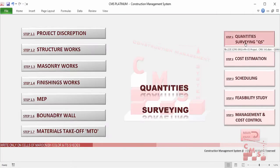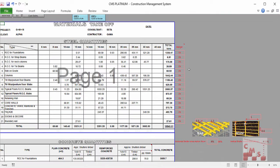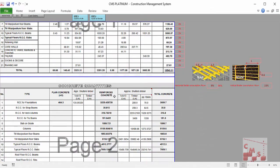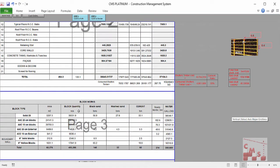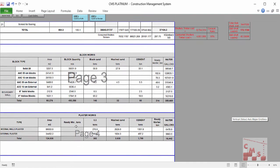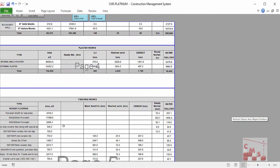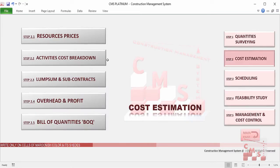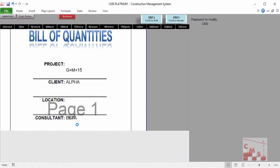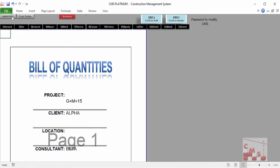We'll see how CMS will help us in quantity surveying work, providing a material takeoff with detailed material required for each element and each activity — like concrete work, how much steel is required per diameter, the required concrete, shuttering, and block quantities, as well as required material for block implementation, plastering and finishing. We'll also see how CMS provides a clear cost estimation per activity, an activity cost breakdown, overhead and profit calculation, and automatically produces a priced bill of quantities covering all construction divisions.